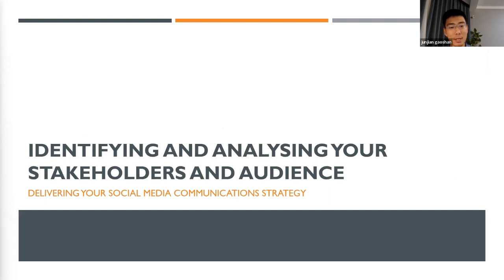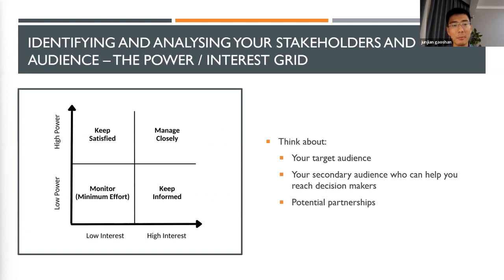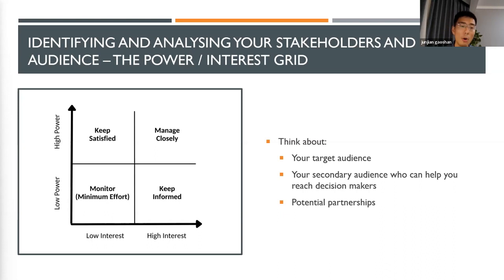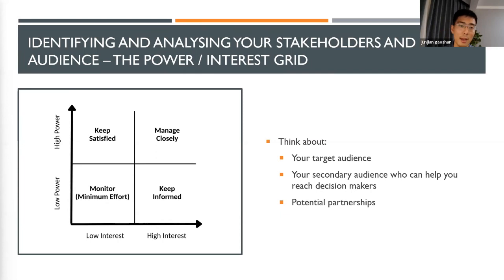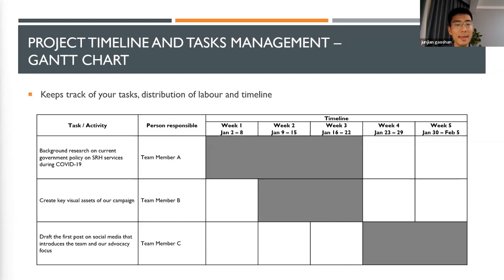With your message developed, you need to know who you are going to deliver it to. For that, I'll introduce the stakeholder map — a matrix that helps you categorize stakeholders into four groups. Those with high interest and high power need to be managed very closely. Those with low interest and low power need to be monitored with minimum effort. Other groups need to be kept satisfied or kept informed. This tool breaks down the subpopulations that matter most to your advocacy.